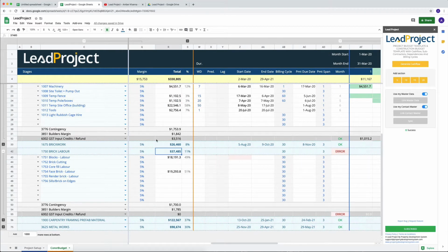And in here, as I said in the previous video, these dates, you either have to enter them manually in the start date section. You can't enter anything in the end date section. The end date section automatically gets calculated based on the number of your work days.